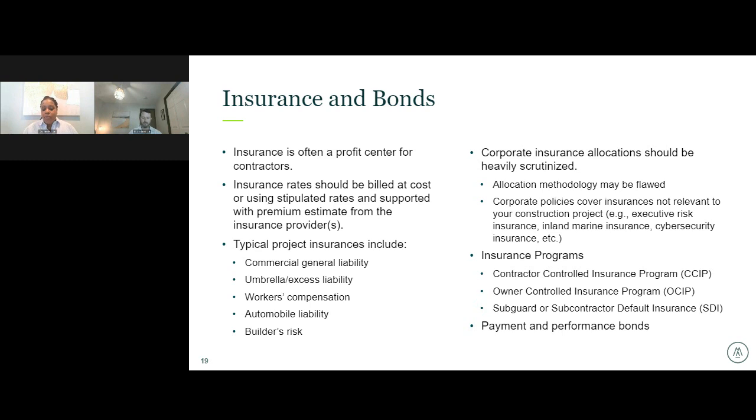When we look at it from an audit perspective, and when we're reviewing terms in a construction contract, we're really focusing on what it specifies as far as who's allowed in that insurance program, and what the controls around that are. So from a control standpoint, we want to know what the policy says about who can be enrolled and who cannot be enrolled. Typically there's language about contracts under value X being automatically excluded. And then from an enrollment standpoint, you want to know who the contractor is saying is enrolled in this program and who is not. Anyone who's not would be covered under a bond, and for anybody who's enrolled, you should make sure that the percentage they're applying is accurate and that it's actually based on the total contract value for the enrolled subs.